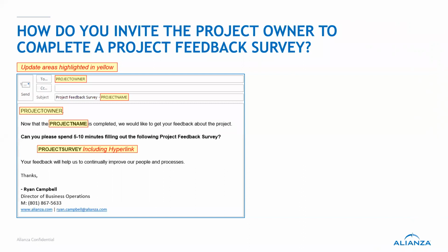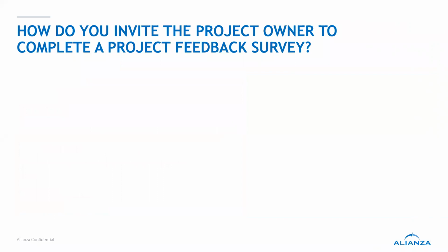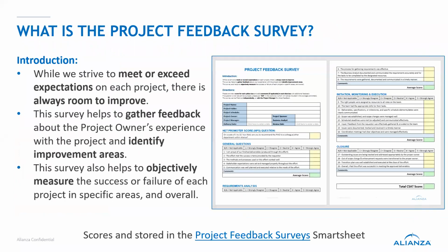Does the survey have a place to put the empirical evidence that the project success criteria had actually been fulfilled or met? There is a question that asks that explicitly, and each one of these is just like a 1 through 5, how well did we do? And then at the end of each section, there's a comments box, like give us more detail, more color, that kind of stuff. But yes, you got to make sure that you ask somebody, did we explicitly get the success criteria that we defined completed? Are you proud of these objectives, like what we met? There's some stuff about that. Yes, that's important.